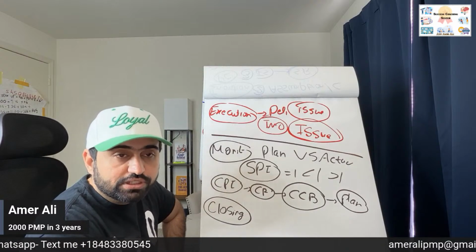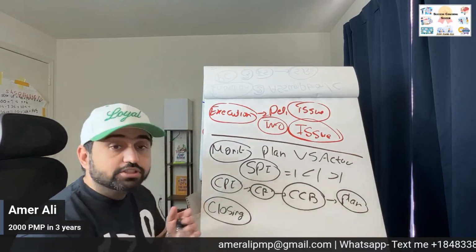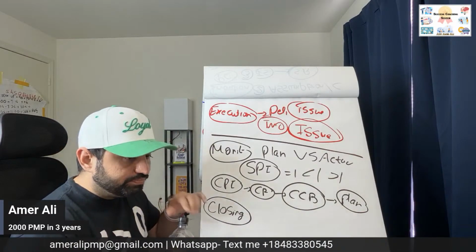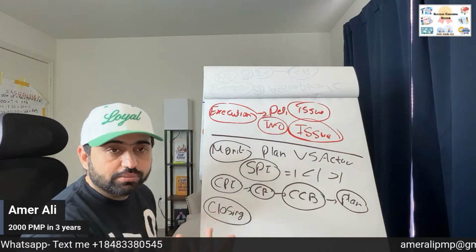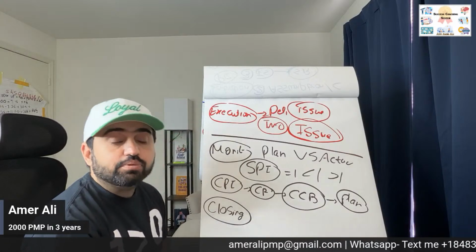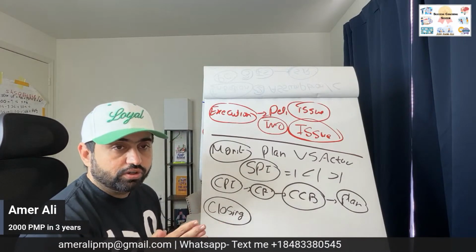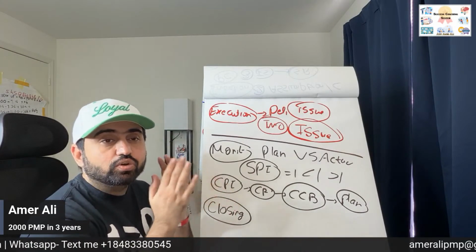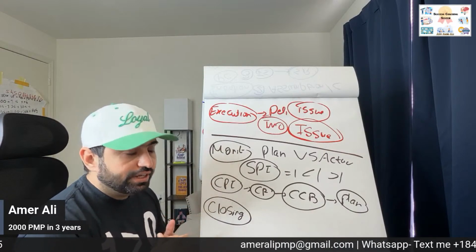You go to the sponsor, ask the sponsor, hey sponsor, can I start closing of the project? Sponsor gives you approval of that. Once the sponsor gives you the approval of the closing, then you start closing of the project. Then there's a sequence that comes. Or if the project is rejected, or the project is too risky, we cannot continue. The project is too challenging, we cannot continue. Both can lead to closing. So we are in closing. Now when we go to the closing, we get the sponsor approval.